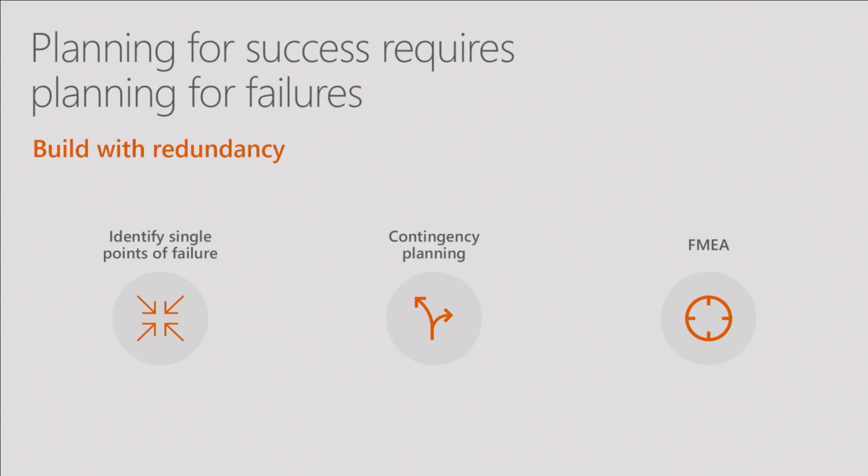And we talked a little bit about some of this already. Basically, planning for success is really planning for what types of failures might happen. We've gone through every workflow we have and looked at what our single points of failure are. It's really easy to miss one thing, and as I'm sure you all know, that one thing you forgot about is the one thing that's going to fail. It can be as simple as a power strip, if it's on the floor and somebody steps on it. So really just try and think about every little piece of equipment, where it's all connected, how it's all powered, all the way through end to end.